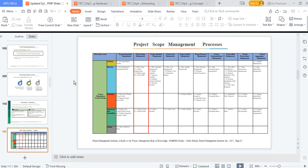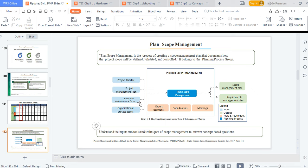How do we manage scope? For plan scope management you need your project charter, your project management plan, enterprise environmental factors, and other documents. You conduct meetings — like the one I just finished — to atomize our scope and help plan it. Scope management is the process of creating a scope management plan that documents how the project will be defined, validated, and controlled. If we don't define it, we can't verify it has been deployed or control whether the client exceeds what was agreed.